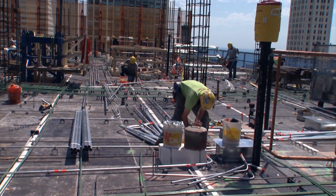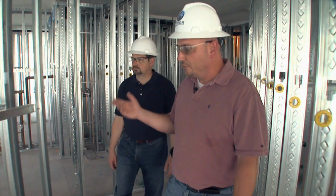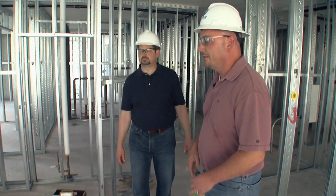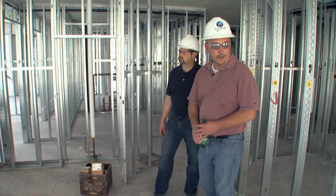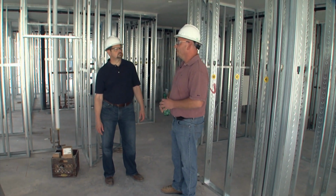And the next phase will start coming up here once we complete with all the roughing in the walls. The city inspectors will come through here, give us the approval, and then we'll come up and start drywalling the next units. Okay. This is a perfect example of a 2-bedroom unit, 2-bedroom, 2-bath. Framing is in for the kitchen. This would be the kitchen area in here, little island over here, bedrooms and bathrooms. And you can't complain about the view, that's for sure.